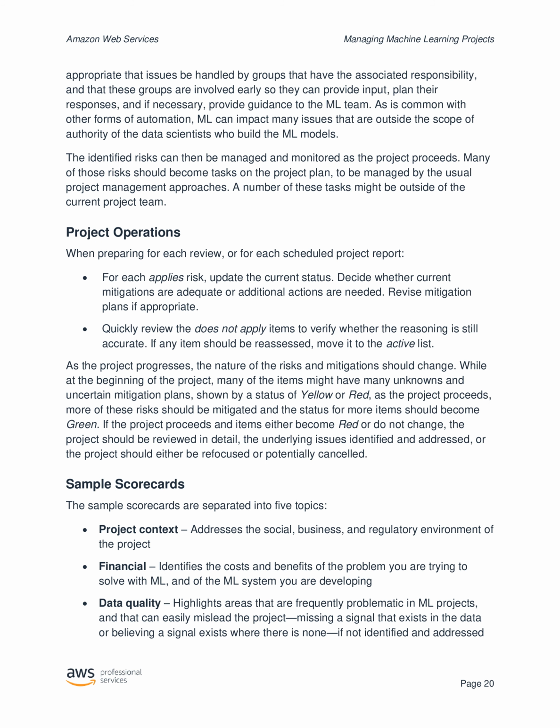The identified risks can then be managed and monitored as the project proceeds. Many of those risks should become tasks on the project plan, to be managed by the usual project management approaches. A number of these tasks might be outside of the current project team.